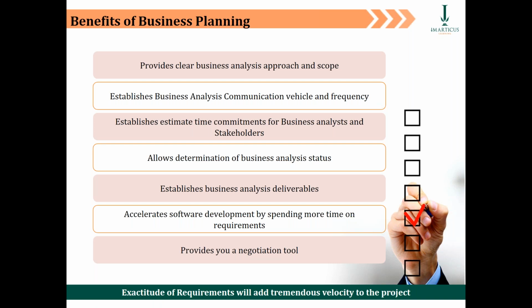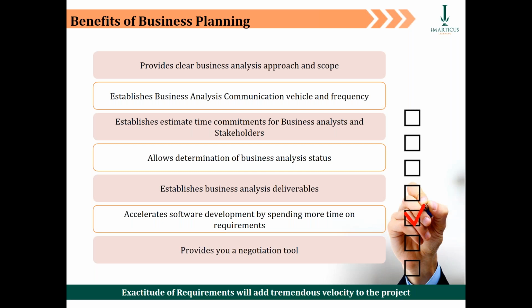Once you have developed this approach, you step into the communication part, because after the approach, you take some time to first analyze your stakeholders, see who's important and who's not, and then on that basis, you design the frequency of communication towards them. That's step number 2.